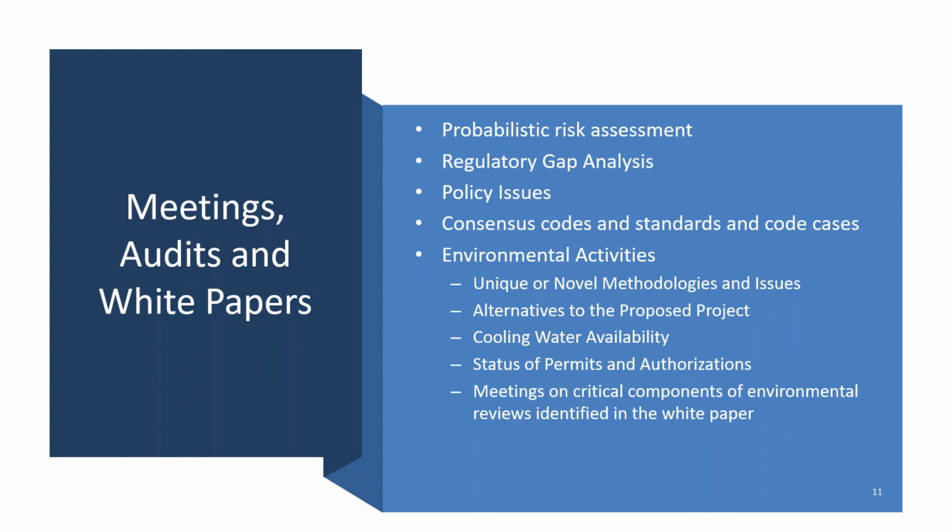So again, having those discussions early would allow us to develop a strategy and provide you feedback on things like pointing out permitting that we've seen needed before, either with state agencies or otherwise, that you should be engaging on potentially separate from your licensing activities with the NRC, but that ultimately support the licensing of your facility.